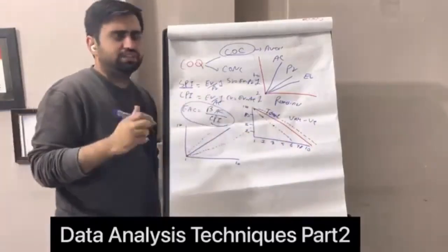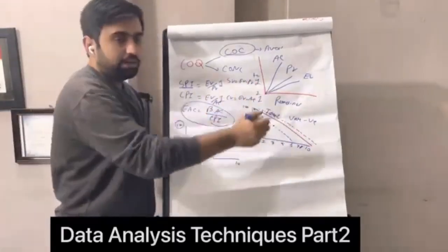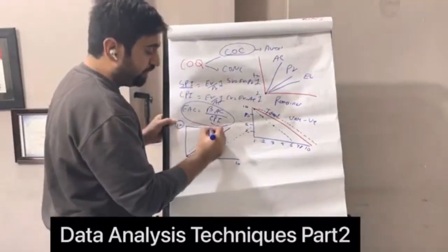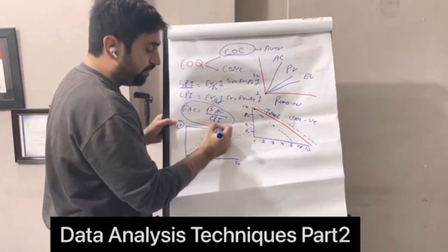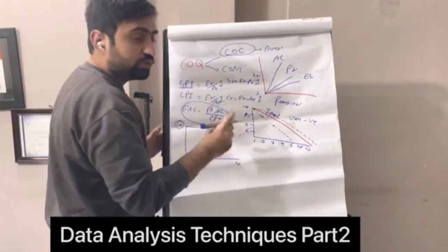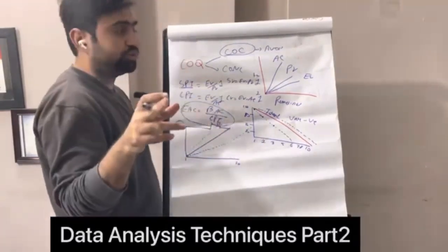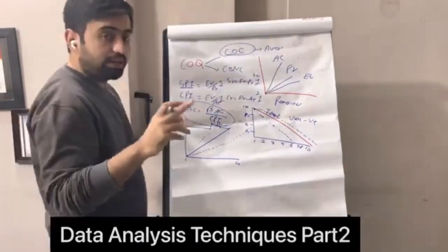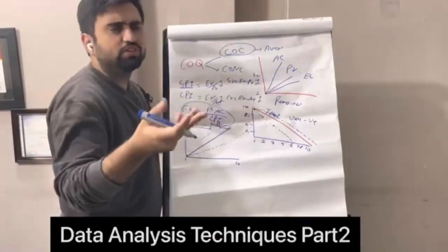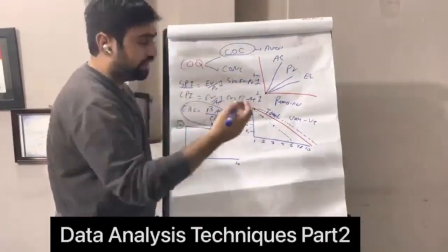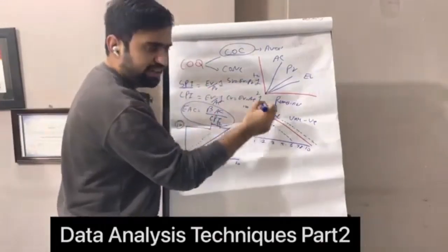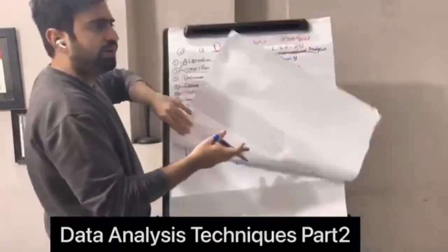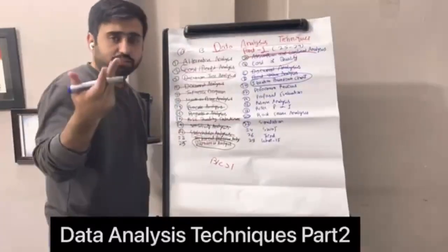An additional feature that a burn up chart has over a burn down chart: let's say the scope is 100 story points, and at some point the scope is added and it becomes 120 story points. That can be shown in the burn up chart, but it cannot be shown in the burn down chart. You can also use a burn down chart to represent risk, how much risk is left, and if the risk is going down, you can easily know that you are managing risk properly.